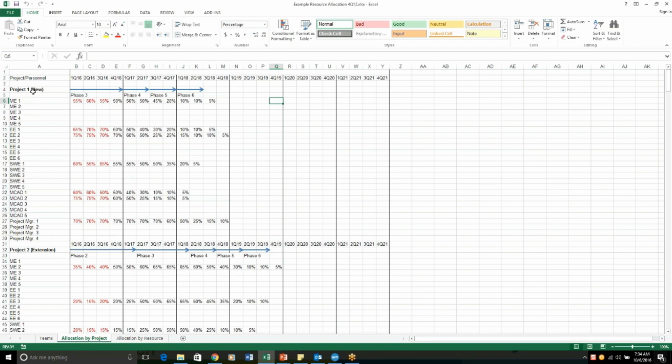So down the left side here is project 1, 2, on down through the spreadsheet, and then lined up under each project are the resources that you're trying to plan for. Now you might choose not to put in, for instance, I've got CAD resources. That might not be something, again, because you don't want every resource in there. If there's not a lot of switching costs, then really over time you'll get a feel for the load on those kind of resources, and you can manage those a little easier.